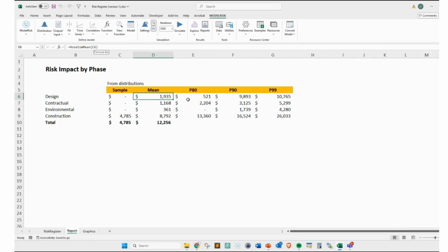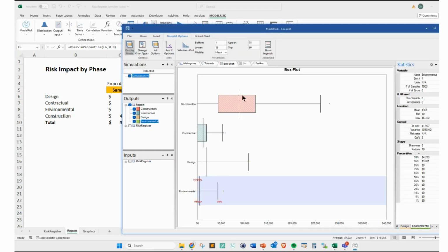Remember, both sim mean, both sim percentile, P80, P90, P99. So you can take a look and disaggregate the P80s for each one of them. Remember, you cannot sum P80s. The only statistic that you can sum is the mean. You cannot sum P80s, but you're going to have a very nice idea of it. Finally, and with this I finish, and I will open the floor for questions.